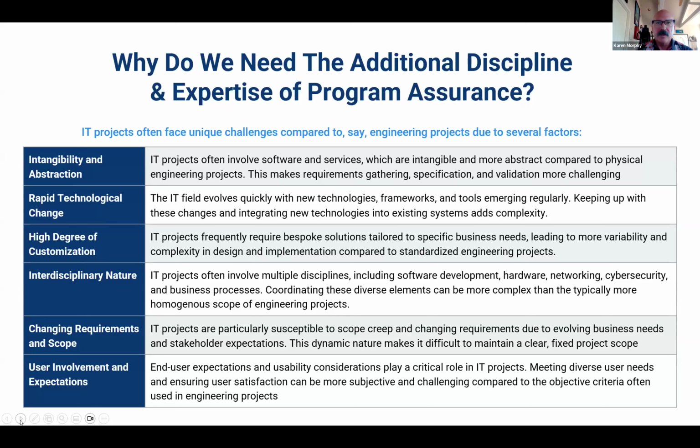As we move away from the abstraction of the project and folks start understanding what they would like to do with the applications, then the complexity can grow. So sometimes a lot of projects just stick to a minimum viable product to mitigate that risk rather than take on the expanding scope out of the gate.